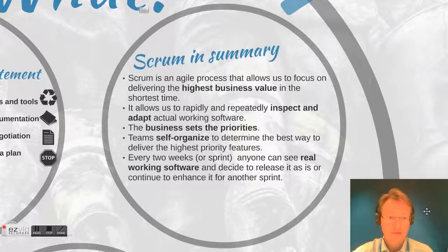Well, every so often, 2 weeks, 1 week, every day, anyone can see real working software. That is, after each sprint, you should have something that can potentially be delivered to production, that can actually be used by real people in the real world.